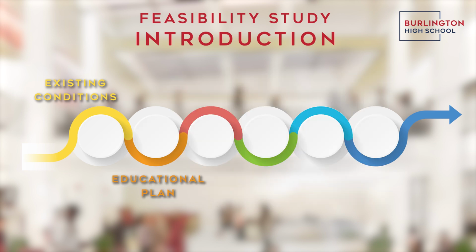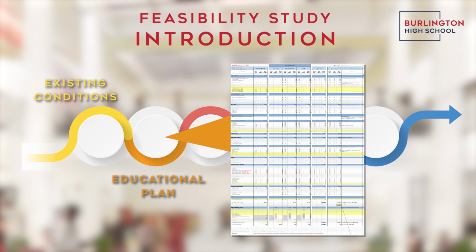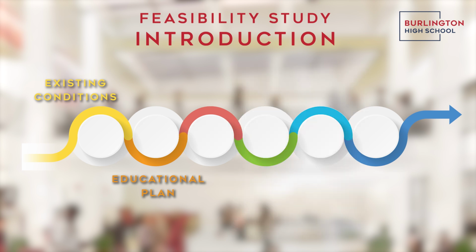At the same time, an educational plan and educational space programming template is created with the school and the district. This allocates all spaces in the building with current and future needs to determine deficiencies in the space, both in terms of square feet and educational appropriateness. The non-educational spaces and programs that are more community-facing are also evaluated. This first step was completed in March and April of this year and helped inform the next step, educational visioning.